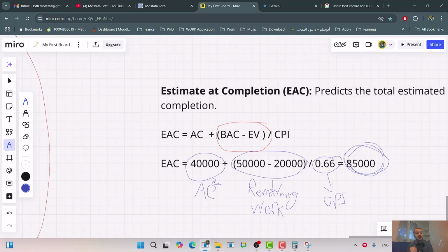So better you find a solution to improve your CPI, because you cannot do anything for the actual cost. It's money that you spent and you cannot recover that, right? But what you can do is improve. You find the mistakes, try to solve them, and improve your CPI. Or maybe your original plan was wrong, try to replan, update your plan, recalculate the earned value, and you may see that you are maybe even ahead of your plan, because your original estimation was wrong. Okay,